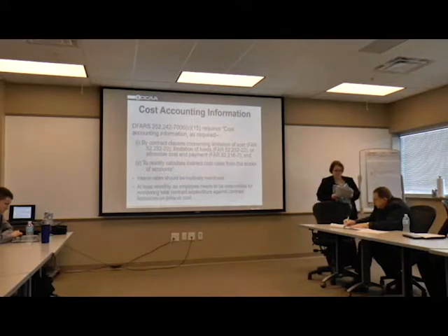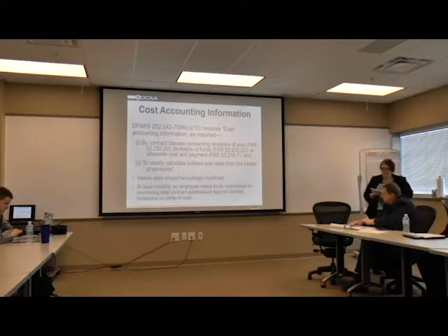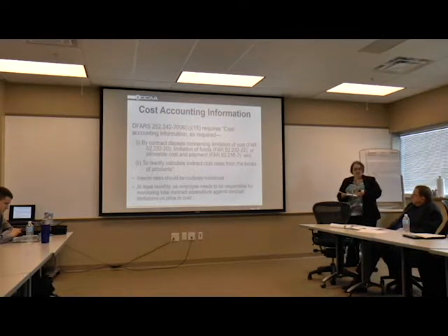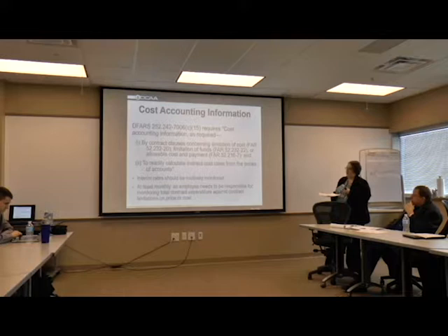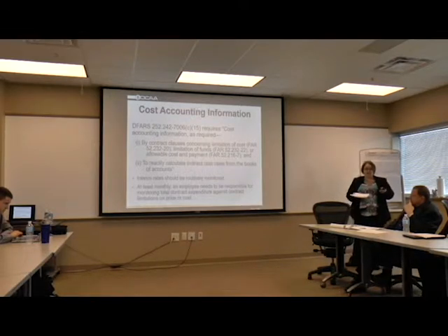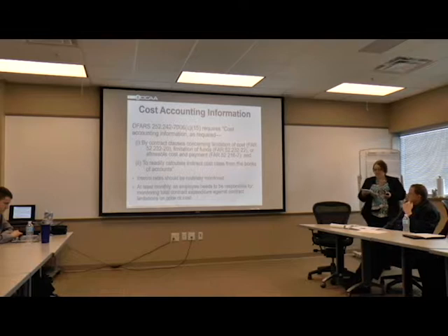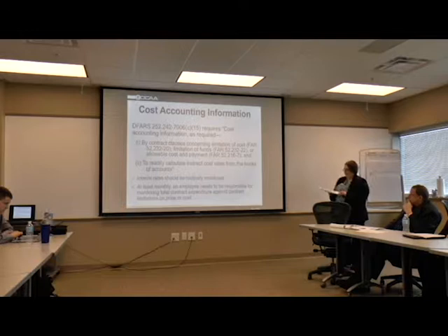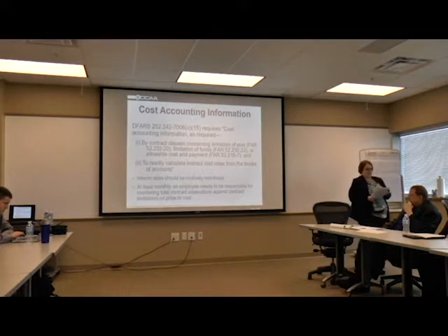price or cost. So again, we talked about before how the ACO provides the provision regarding fee withholding at that 85%, but there's also a requirement for notification to the ACO that you're at that 75% or 85% of your contract value. So this is just more reason those adequate contract briefs are so important, so you know where those limitations are and you know those specific clauses.